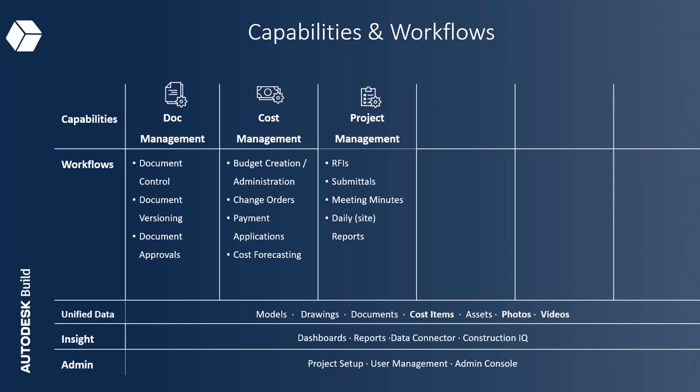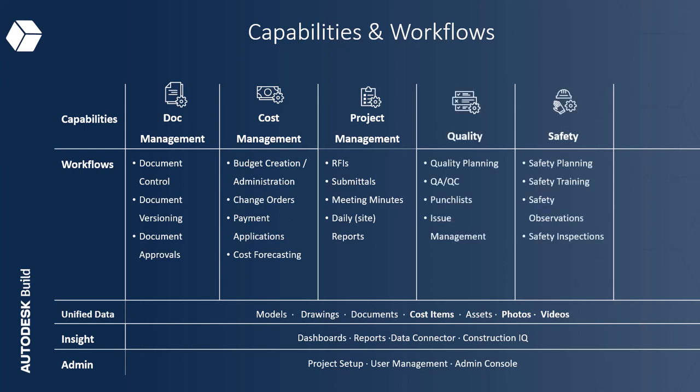Submittals, so anything like workshop drawings, spec sheets, anything that the contractor or subcontractor would be submitting for you to approve. Meeting minutes, so your site meeting minutes, your daily site reports, all of that workflow and capabilities specific in Autodesk Build.